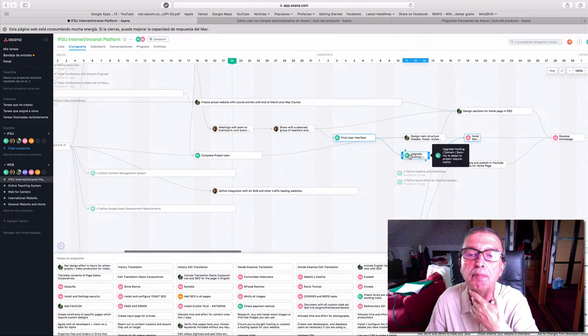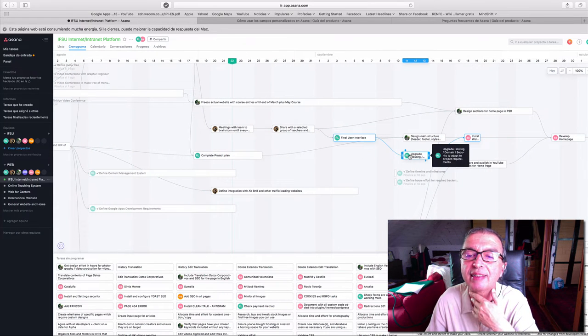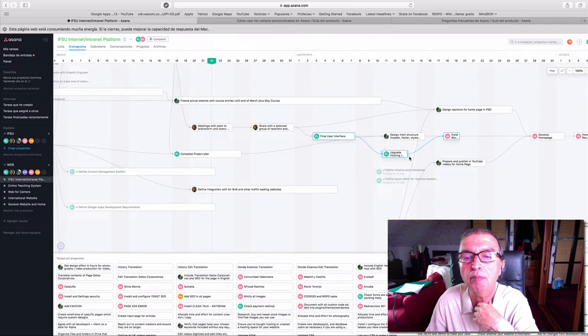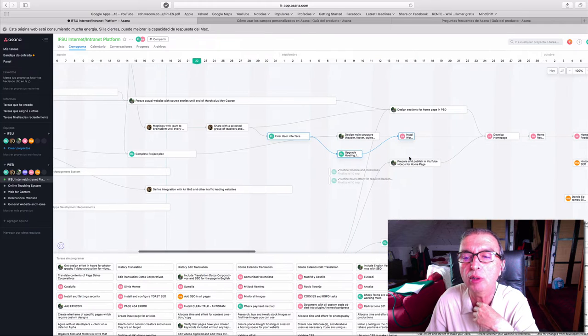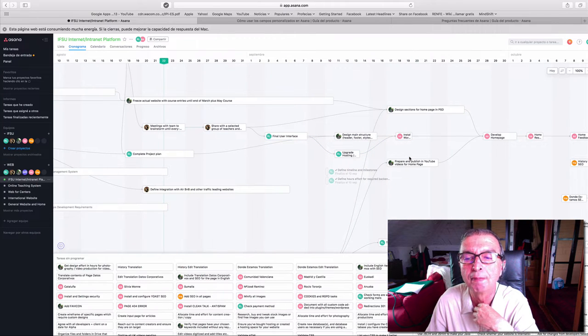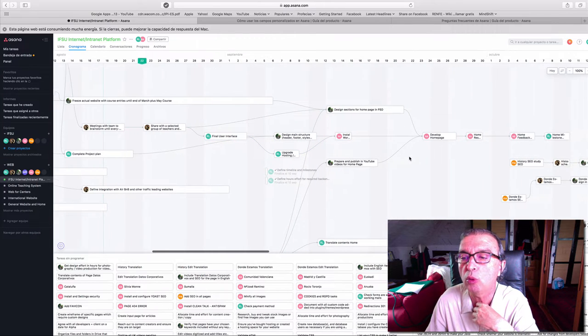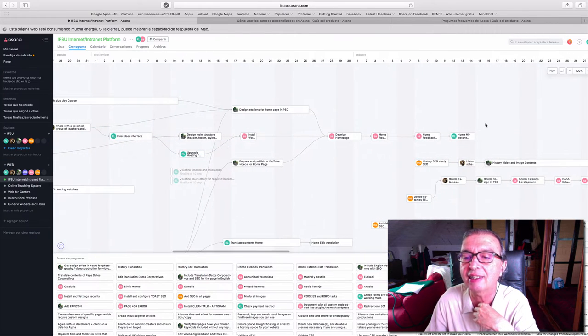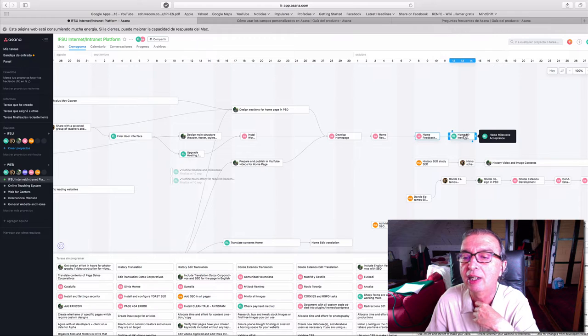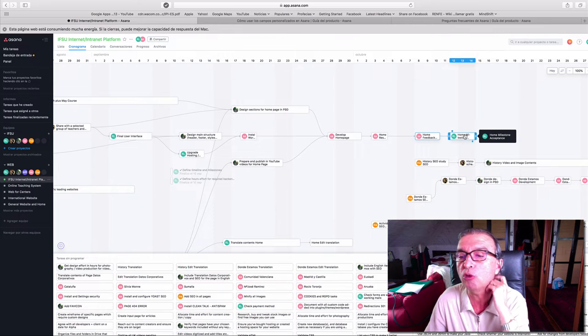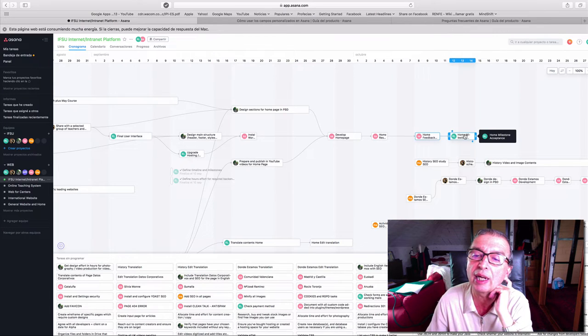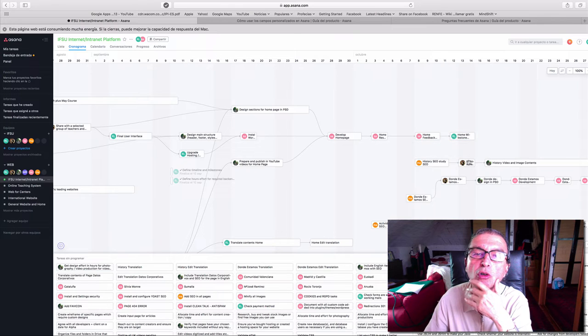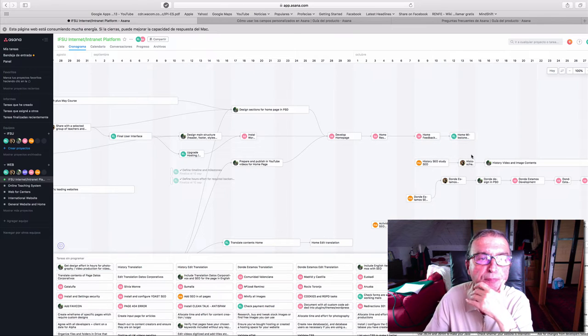We can say that we are on time for the moment with the project, and we will see the first results with the milestone acceptance of the home page around mid-October.